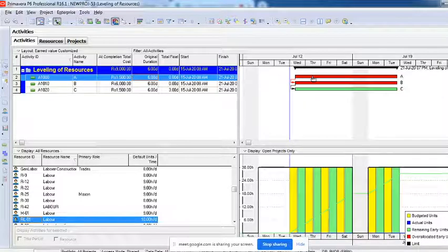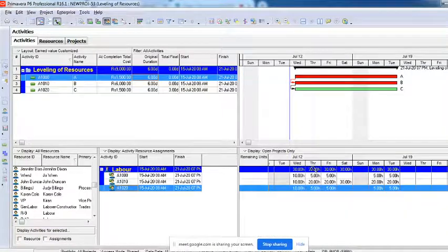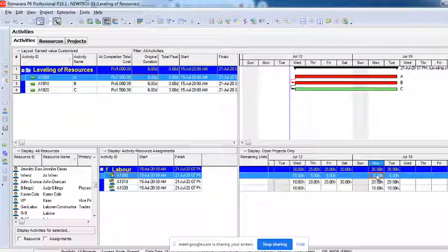If you are not remembering the names like crushing, crunching or splitting, I did not show you about splitting. Splitting is just splitting the work, that's all. On some days you can say it's off, not working on it. I'll make it 0 here, and I compensate that here. I'll make it 10 here, and make this 0.